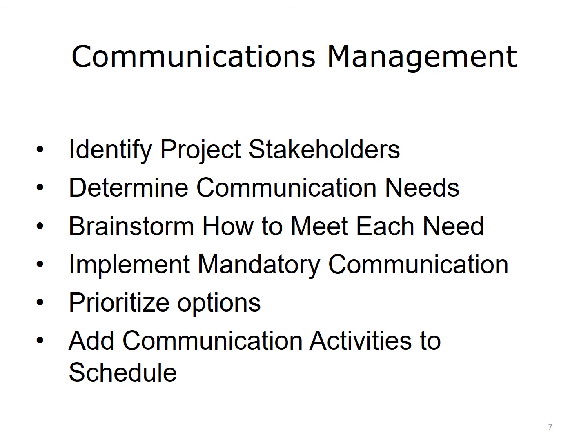6. And finally, create a schedule of communication activities from the prioritized list you created in Step 5. If you do not add the communication work to your schedule, the chance of it getting done is greatly decreased. Your schedule should assign frequencies, due dates, time required, and responsibility assignment for each communication option you decide to implement. Be sure to include in your communications action items that need to be done, who is responsible for the items, and a time frame that they should be done.